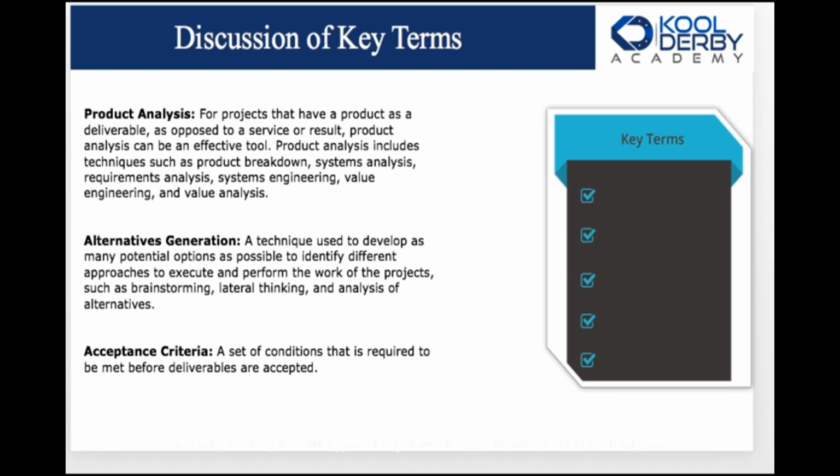Well, everything that I just described is acceptance criteria. When we collected the requirements, the customer said, hey, I wanted to do this, I wanted to do that, I wanted to do that. So at the end of the work, when we are validating the scope, which happens later, we go, hey, did it do everything the customer wanted? If so, we can check mark that and say it met the acceptance criteria. Okay, I want you to know what that means because it's very critical. I'm spending a lot more time on these terms because they're just used so often on the exam. I hope that makes sense, and if not, go back and review it on your own.